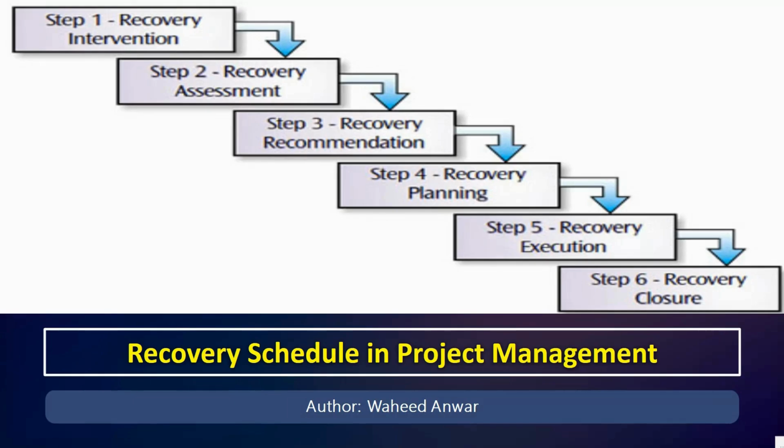Okay, and you can say unlike the baseline or initial schedule, the recovery schedule focuses on problem solving of the project. So it identifies where the delays have occurred, assesses their impact, and then introduces targeted solutions, such as adjusting activities, adding extra resources, or resequencing work.